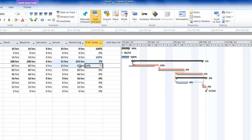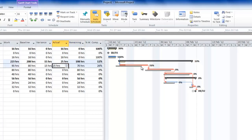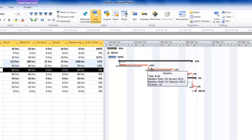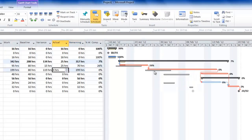We can show that 15 hours of actual work have been done — Project automatically calculates this as approximately 19% complete. If the project manager has determined it's going to take longer than planned, we can update the remaining work accordingly. To show a severe case, let's enter 99 hours remaining — you can now see how the baseline has been severely impacted by problems in the middle of the project.